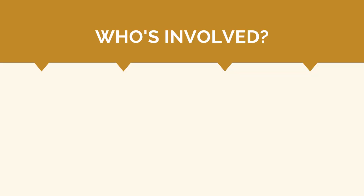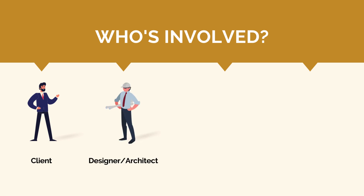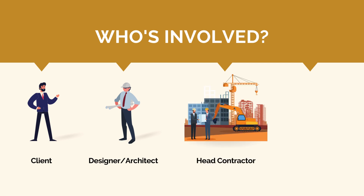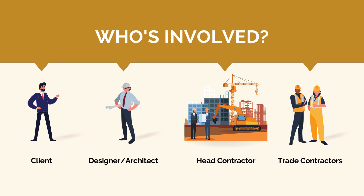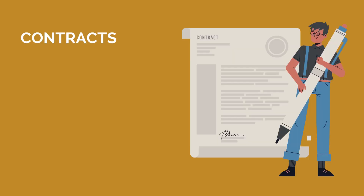On any project, as a minimum, we'll have a client who's the project owner paying for the project to be built, a designer or architect who drafts the drawings and specifications, a head contractor engaged to manage the end-to-end project delivery, and trade contractors engaged to complete specific scopes of work. Each of these different parties need to work together collaboratively. To do this, we need a way of defining the relationship between each of these key parties, defining the specific scopes and responsibilities — and to do this, we use contracts.